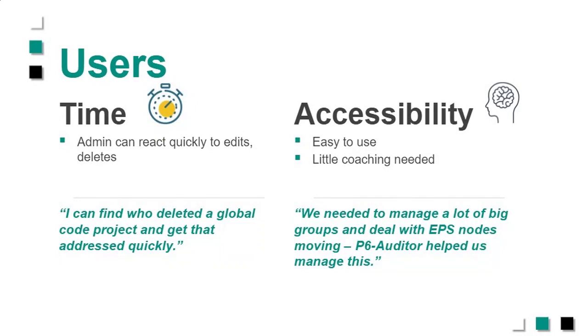Now, Sue mentioned that she had 30 days of information, so there is a controller on the audit tables and how long you can hold on to them. For some of our clients, we're only keeping 7 days, and that's mostly because of the volume. So when you've got millions of UDFs in your database, which some of our clients do, then it can be a heck of a lot of data in the system. So you can control that. So that's something to keep in mind.